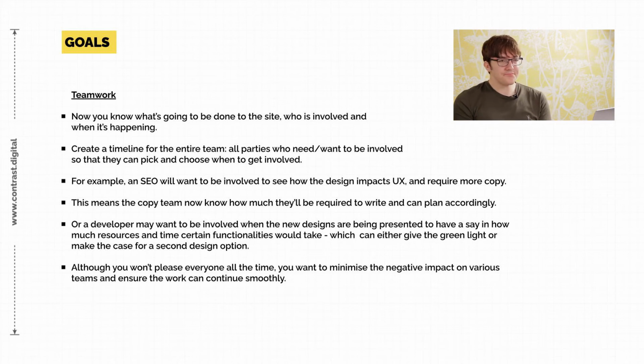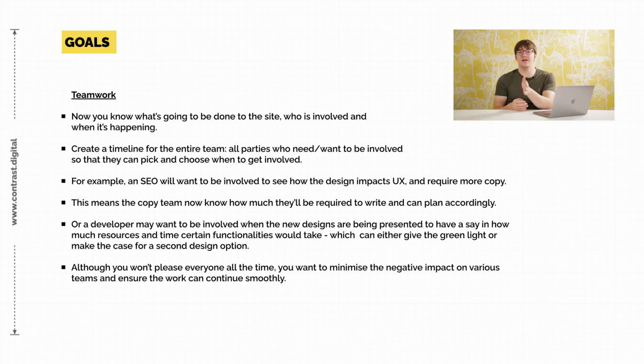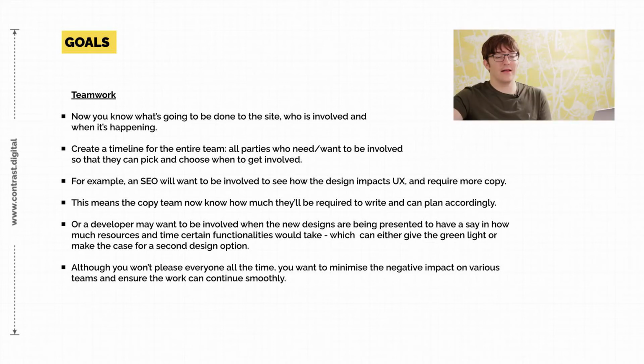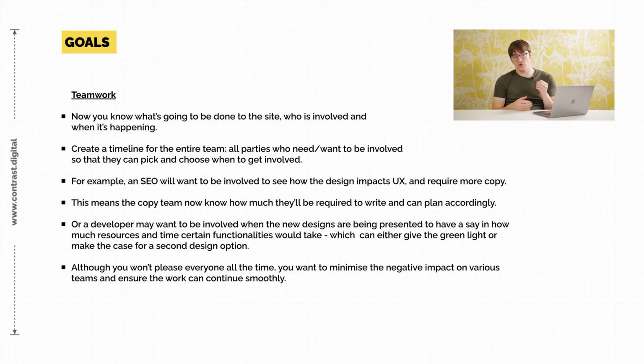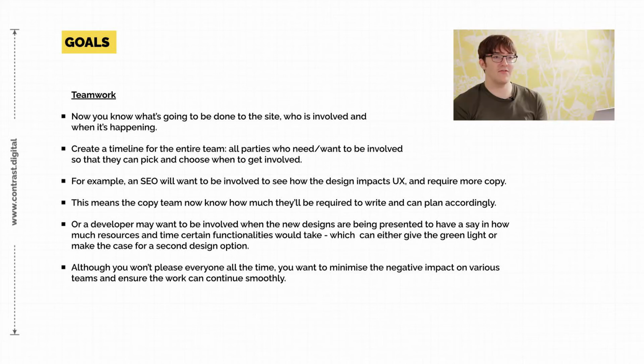For argument's sake, UX need to have completed the redesign at X stage, copy need to have done the new elements and copy for the design by X, and then the devs need to have done their testing by this stage. This way everybody knows what's expected of them at which point in stage. Unfortunately, we're not going to please everybody going through this process, but like we've said, we're just trying to minimize impact and get as many people on side as possible, so everybody has clarity and understands what's going on, when, and what has to be done.